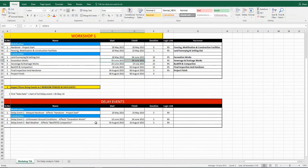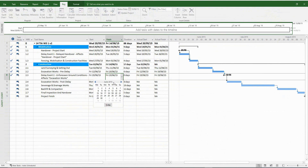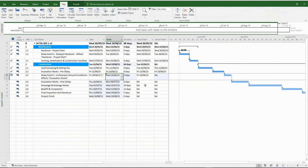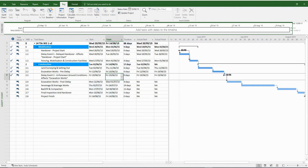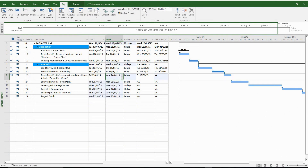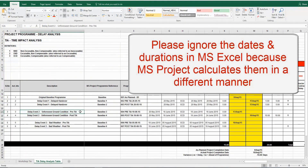Now it's time to insert the relevant delay duration for delay event number two. Please enter the 24th of June as the finish date — we get a duration of three days, which will not tie up with your Excel spreadsheet. This is because weekends are not taken into account in Excel, which is why we have five days in Excel and three days in MS Project. While carrying out a time impact analysis in MS Project, please make sure that you simultaneously update the delay analysis table in Excel.